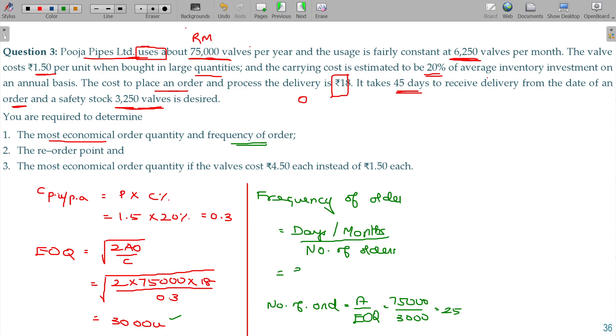Days in a year being 360 days divided by 25 equals 14 days. Once in every 14 days you are ordering your requirement of 3,000 units. So you are purchasing once in every 14 days - that's called frequency of order.